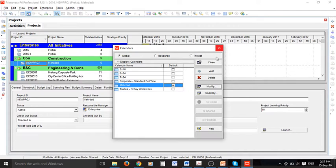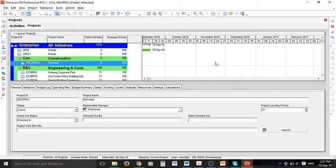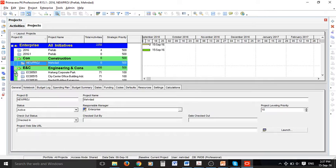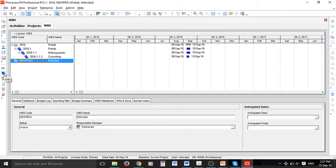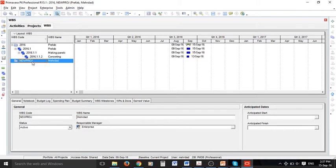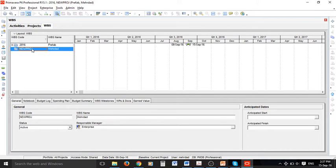So now we have this default calendar for our project. The next important thing is to have a work breakdown structure. Unlike Microsoft Project, it is compulsory to set a work breakdown structure in Primavera before defining activities. We can select WBS icon on the left hand side menu and here we can go ahead and define the work breakdown structure for our new project which is Merdad.